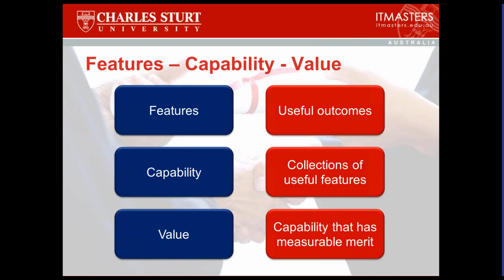Yep, another one here is whose responsibility is it to translate user stories and decide what will be developed? The simple answer is it's everybody's, but the core of the answer is to say that, first of all, the interpretation of the user story into what's going to get done is a combination of the team members that are actually going to be doing it, the product owner to make sure that it is interpreted from what information they have, and the Scrum Master to make sure that it is done correctly.